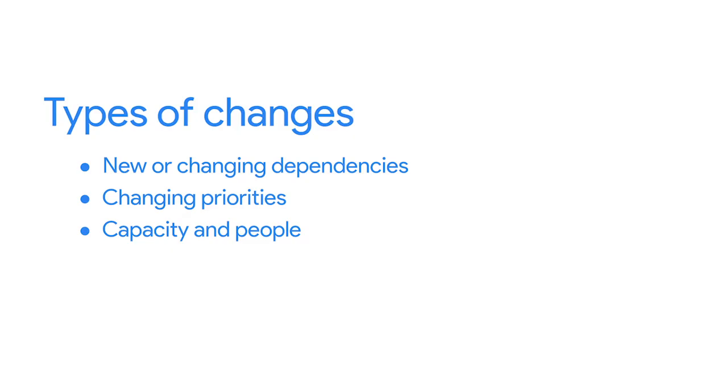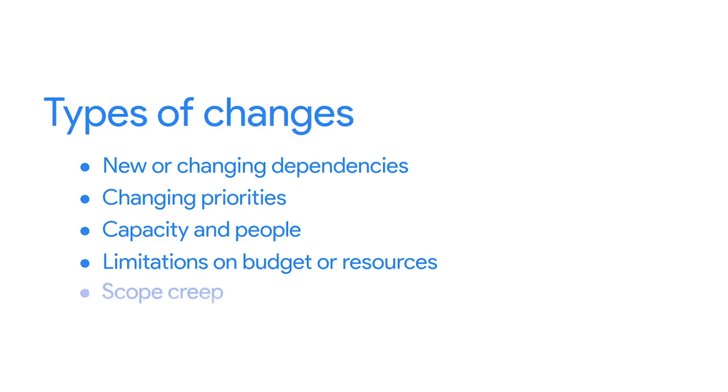Another type of change could include a new limitation on your budget or resources. For example, you need to reduce design costs in the new bathroom by 10% because your quotes for electrical work come in higher than expected. Another change could be scope creep. Scope creep is when changes, growth, and other factors affect the project scope. For instance, your clients are so happy with the tile in the new bathroom that they'd like to replace the tile in all of their bathrooms.